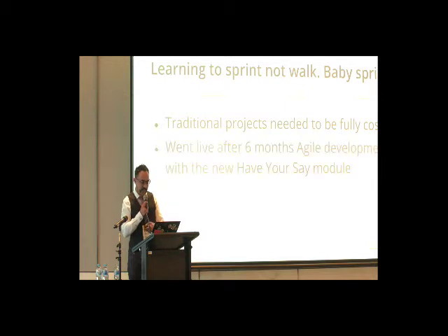What we found with Agile, though, is that it was a little bit more fluid. We had to begin some kind of discovery process to even understand what we were trying to build and how we were actually going to build it. And that was going to inform a reasonable estimate for the build.